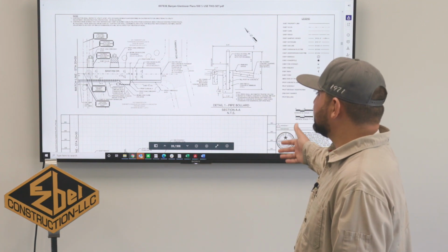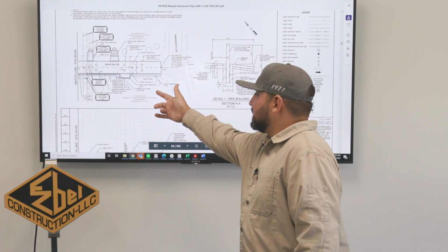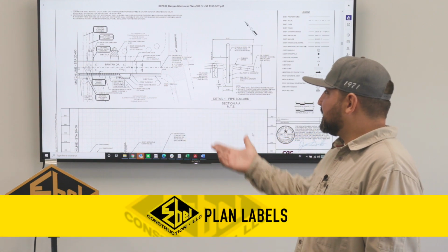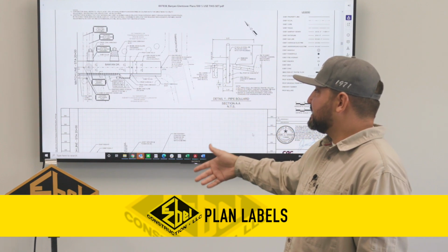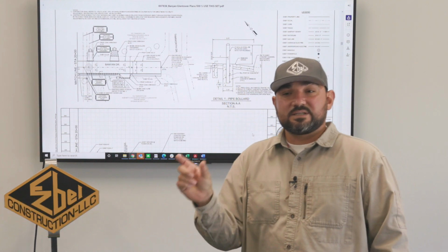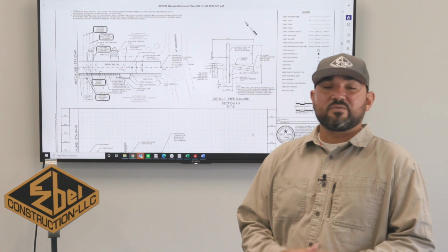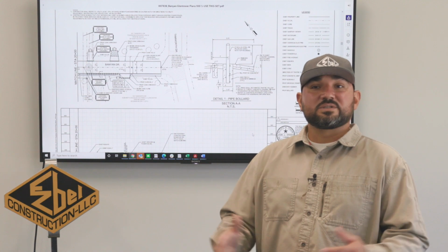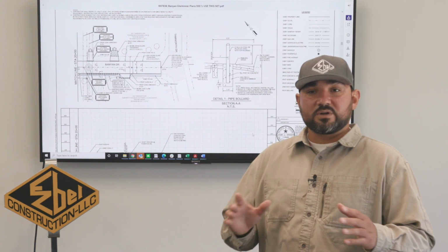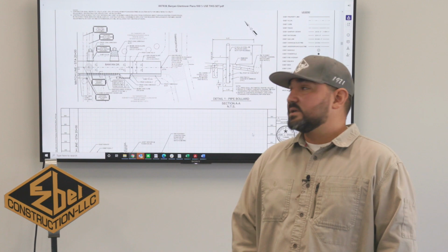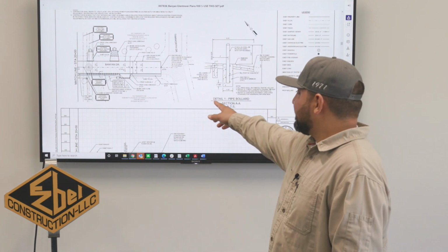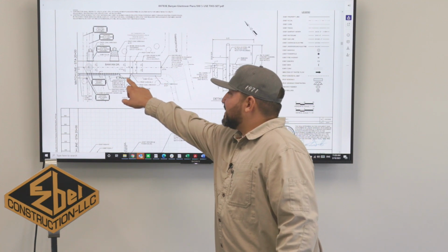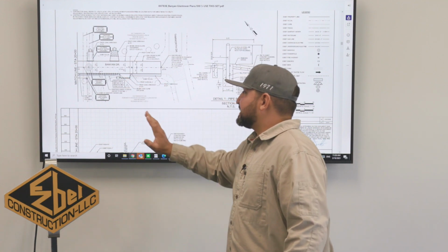It's going to show you your sidewalks and your driveways. All driveways are labeled, like here is B17, B16, there'll be C4s. That's just the identification of the driveway, and on the driveway summary sheet, you'll be able to know what the penetration is, what size driveway you're going to build according to the plans, and what they're going to pay you for. As you can see here below, we have a 5-foot sidewalk coming in, and then your driveway, and it's telling you 27 square yards.